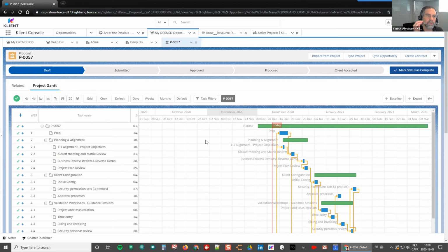This being said, this worked well when the project has not started yet. But as soon as you started logging some hours, because the task assignment schedule and everything are linked to that task, moving those will change the pattern of assignment too. So there would be some constraint for that. But for sales projects, we were talking about it yesterday, Dominic and I, it might be of interest.